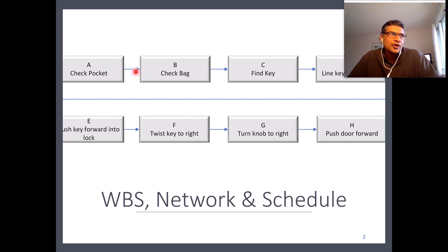Now what does this arrow mean? The arrow shows the dependency between the tasks: what has to complete to start another one. This is the relationship between the tasks and how they have to be managed in a sequential fashion so that we can accomplish a goal. It's called task sequencing. So this slide represents how we can represent a task and how we can build a relationship between tasks to meet the final objective.